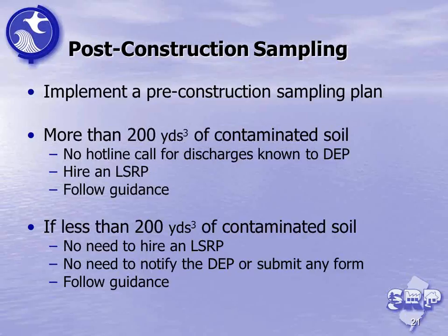If there's more than 200 yards of contaminated soil, then you're able to go ahead as per the guidance document. No hotline calls are required for known discharges. These are discharges that are known to the DEP program, sites that are already in the site remediation program, that are already on the known contaminated sites list. You need to hire an LSRP and, of course, follow the guidance document. If there's less than 200 cubic yards of contaminated soil anticipated, then there's no need to hire an LSRP. There's no need to notify the DEP or submit the LCP notification form. You can just go ahead and follow the guidance document.